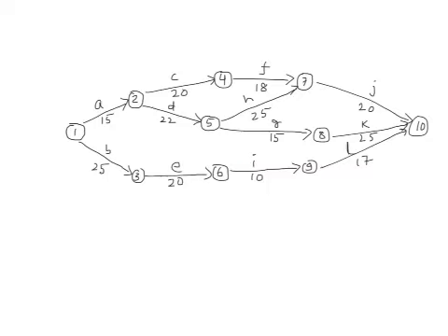After that, the question asks that what is the project completion time? We have the activities written here and the activity time written here. So we will calculate the earliest time for all the nodes, and we will see what is the earliest time at node 10, and that will be the project completion time.